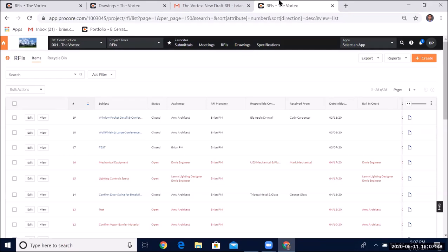And if it's a big RFI, you need to be engaged with the architects and pick up the phone and talk to them and get it resolved and kind of walk through that a little bit and then follow up on those RFIs. So always provide an answer with your question. That's a great note too, as it relates to developing some standard operating procedures for your staff on site, right?